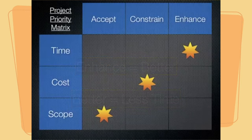So in this particular example, we are constraining the costs. We are willing to accept changes in the scope if it means that we can actually get the project done a little bit earlier.